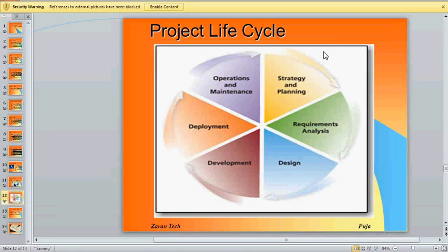How will that impact the project? It doesn't, Yadagiri. Okay? It does not impact at all. That is one of the reasons why we typically break it down into two projects. Both these projects must happen in parallel. There's a dependency. You can't launch your iPhone without the software, the iOS on it, the operating system, can you? And then again, you can't launch your operating system without your hardware, correct? So they happen in parallel.